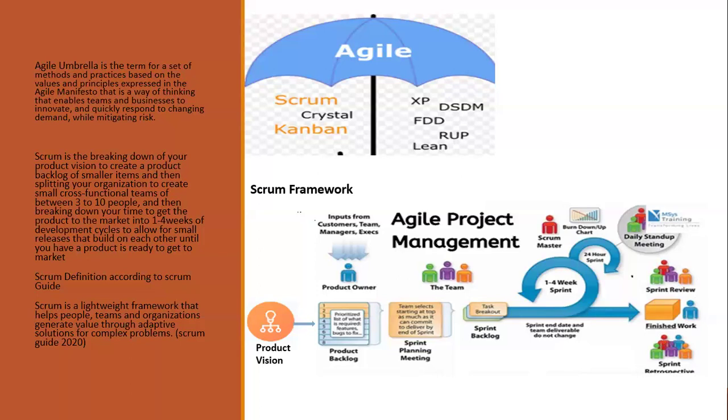This is where the Scrum team, having ended the project and reviewed and demoed what they produced to the stakeholders and others, now the Scrum Master, product owner, and developers join another meeting, whereby they look at what they did right in that previous sprint, what they got right, wrong, and all that, and also plan ways to make improvements for the next sprint. And also, this is an avenue for the team to celebrate themselves.